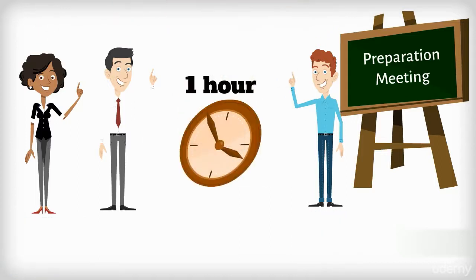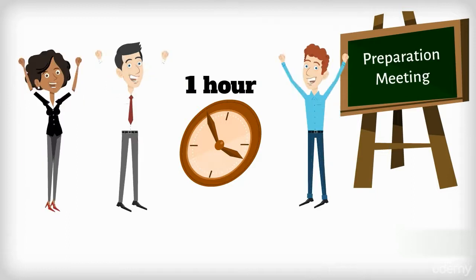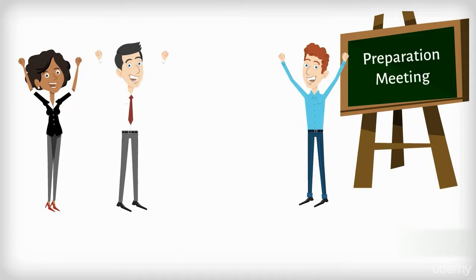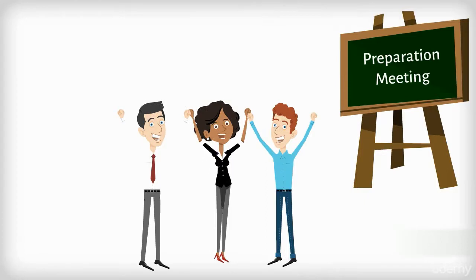I usually time box this meeting strictly to 1 hour and have found that the 1 hour saves the team far more than an hour of delay or confusion in a planning meeting. The team will likely thank you for it and may even hug you, especially if they've experienced uncertainty in planning before.